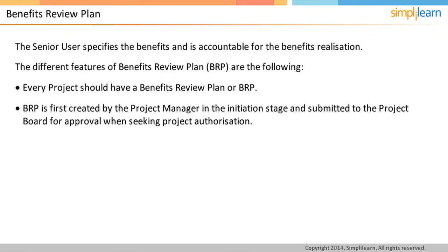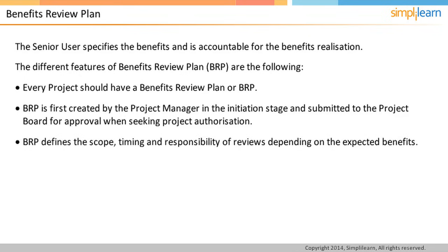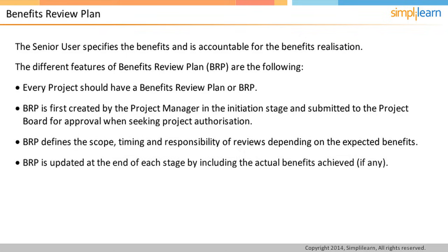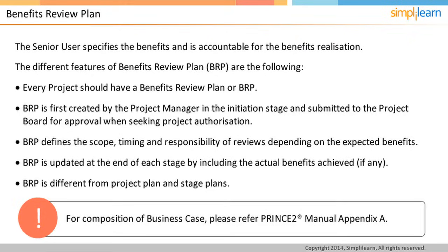The Benefits Review Plan is developed by the project manager. However, by default, the responsibility lies with the executive. BRP defines the scope, timing, and responsibility of reviews depending on the expected benefit. BRP is updated at the end of each stage by including the actual benefits achieved, if any. BRP is different from project plan and stage plans. In the next screen, we will discuss the business case for different types of projects.